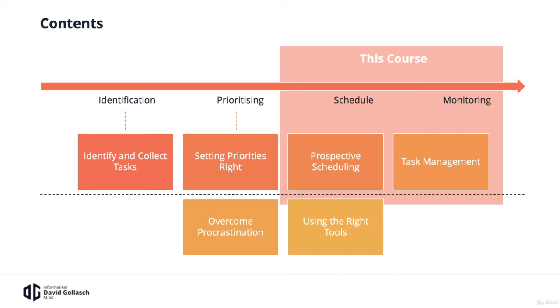so the long-term tasks, if you want to call it like this, and the Kanban technique based on multiple columns that represent the state each task goes through, so going from the first state of being a to-do, getting over to the doing phase, where you say, okay, this task is in progress, and finally the done state where all those fulfilled and finished tasks will get into this category.